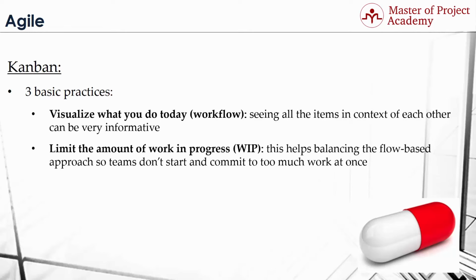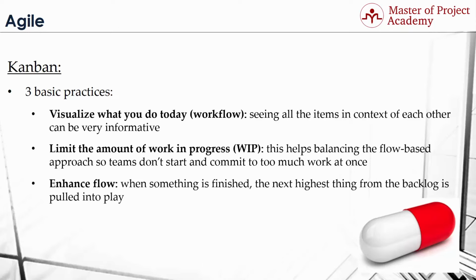This helps balance the flow-based approach so teams don't start and commit to too much work at once. Otherwise, too much work will overburden the team, and this will cause quality to decrease. Enhance flow. When something is finished, the next highest thing from the backlog is pulled into play. Where there is room for analyzing, developing, testing, and deploying a new item in the software development pipeline, the most important feature from the backlog is pulled into the development pipeline until all features of the project are finished.